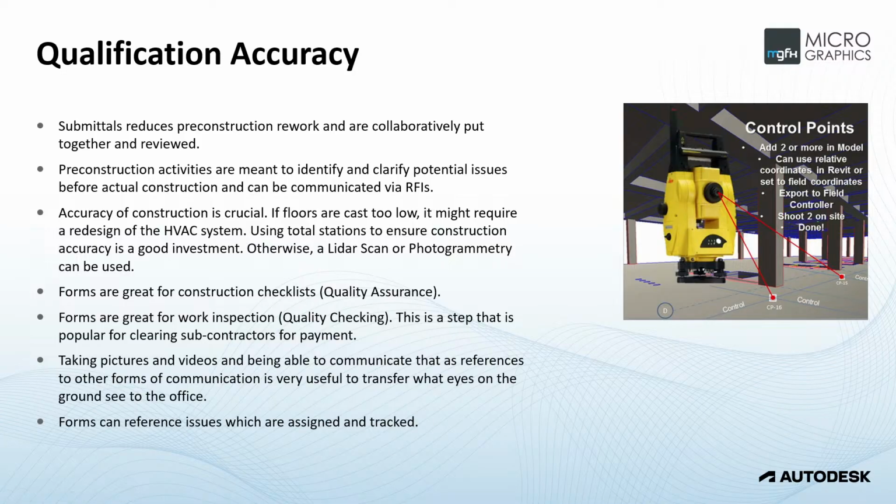I've had, for instance, situations where guys have been on site, mechanical engineers, MEP engineers, and unfortunately what happens is that the construction wasn't accurate enough, and so the floors were poured 100 millimeters too low just because they were lackadaisical. And what happened afterwards, of course, is that there's no head clearance for the occupants of the building, and so the mechanical engineer had to redo the entire HVAC design, and that was very expensive, and again a total waste of money because somebody just didn't construct accurately enough.